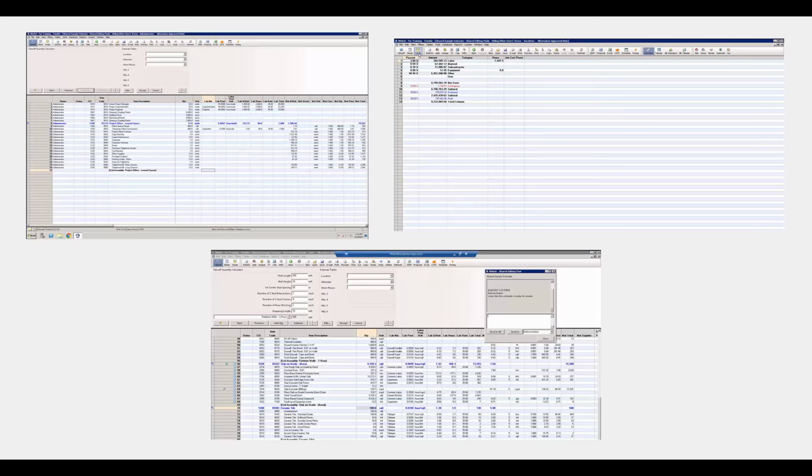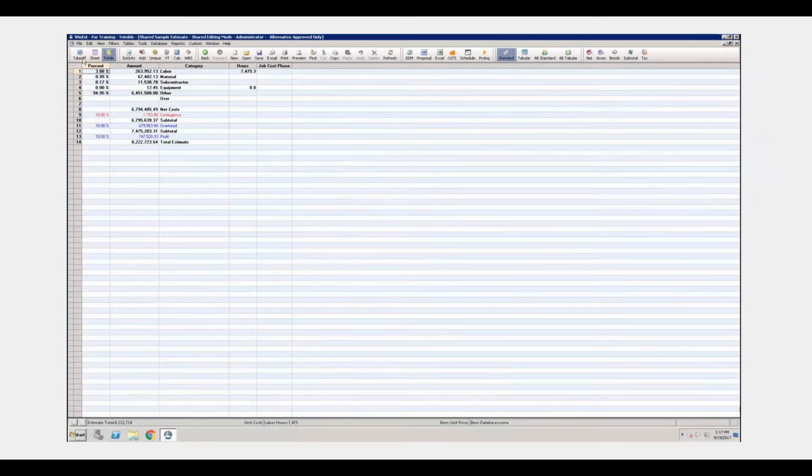And at the right you see Jonathan's screen where he's taking a look at the totals page. This is a bigger view of the totals page. This is where you see your markups. These markups were included in our template and have been updated continuously as estimators quantify items, delete items, and adjust prices.